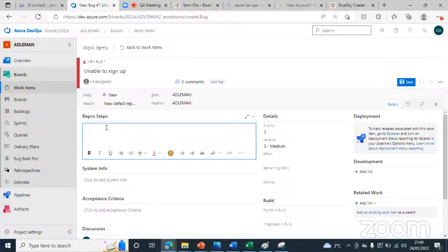That is a user story. Now there's acceptance criteria there, which lists the features they want. It must have a username. It must have an email. The username must contain several characters. So it's going to tell you each of these edge cases to be done. It must have this. So it's going to be stated in the acceptance criteria.